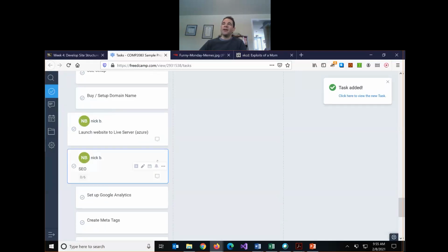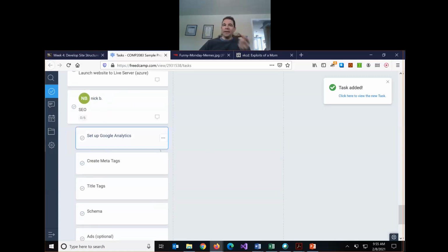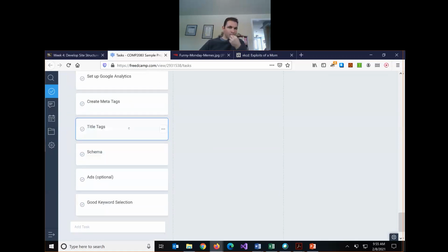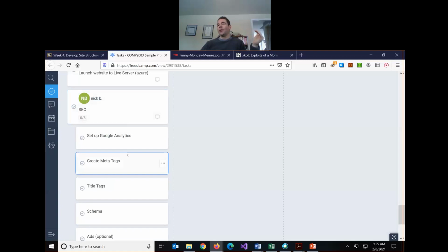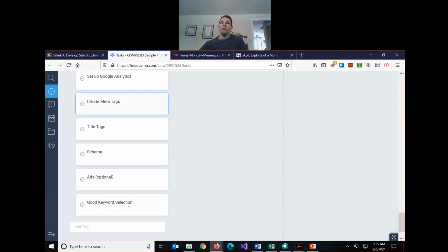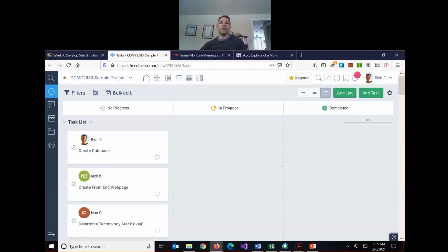Like just to say we got to do SEO, well, that's not very helpful. Right? This is a more helpful list now where we have these specific tasks and we know exactly what we need to do. If we were delegating this work to somebody else, they would know precisely what things we needed. Okay, this is a good list. The idea of creating these tasks and task lists is, again, we could give this task to someone else and they should know exactly what it is they have to do.